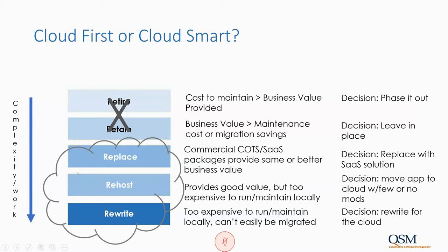Once you decide and identify good candidates for moving to the cloud, you have several options. One of them is just to simply replace it with a commercial or software as a service package that resides in the cloud. This is very, very similar and familiar territory for software estimators because it's package implementation hosted in the cloud. And it can range all the way from fairly simple, if you're just going to migrate your data into it with very few customizations, all the way up to very complex if you need a bunch of custom business rules and reports and add-ons. So a good estimate is going to be very important in helping you decide whether this is the right option for your company.